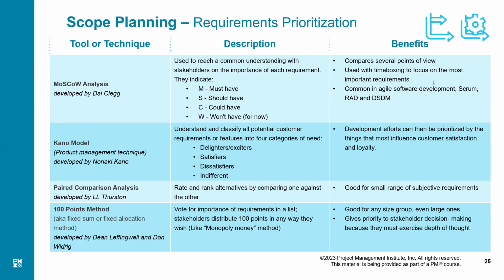So if I have 100 requirements, I will compare requirement one with requirement two, and then one with three, one with four, one with five. Ultimately, whichever requirement is the highest will come on top, and they will automatically form a stack of requirements in a prioritized order, as we do in the product backlog.